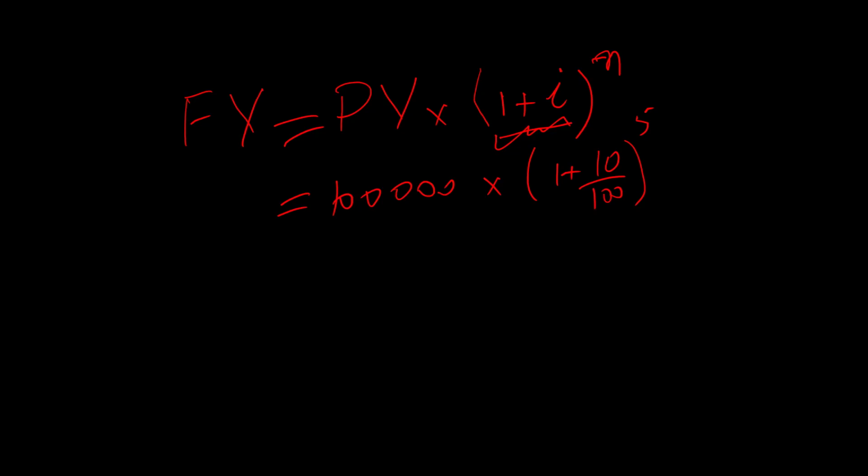But what we are interested in project management, when we are trying to conceive things into the future, and we don't really have that kind of money right now, so we will have another formula that present value is equal to future value, but it is not multiplied, it is divided by 1 plus.